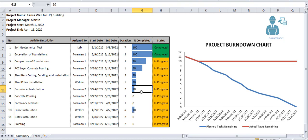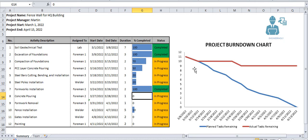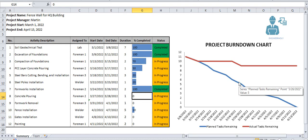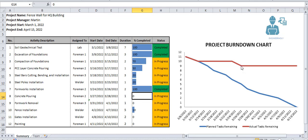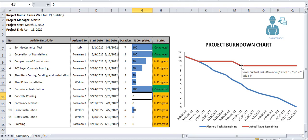As you can see now, at this point we should have had five tasks remaining, while in actual as you can see we have nine tasks remaining. So this is how project burndown charts help you measure your team's performance, track your progress and everything you need for your project.